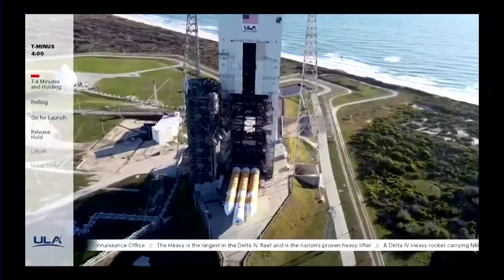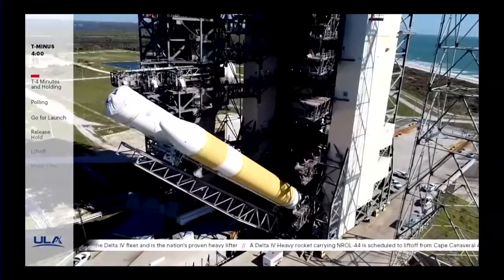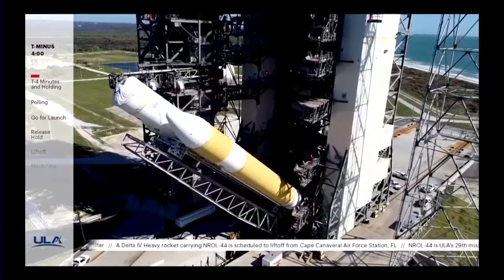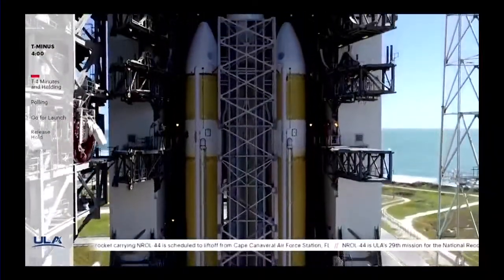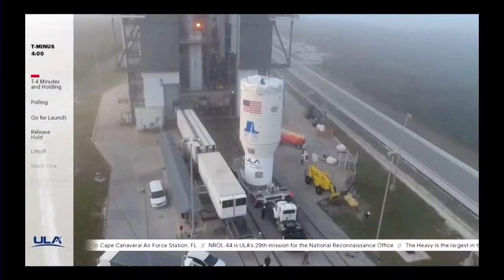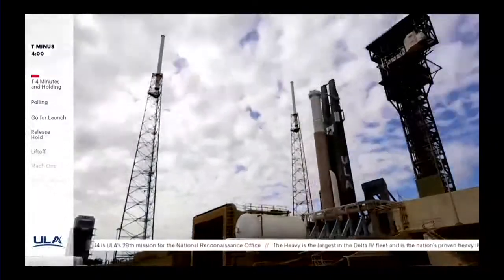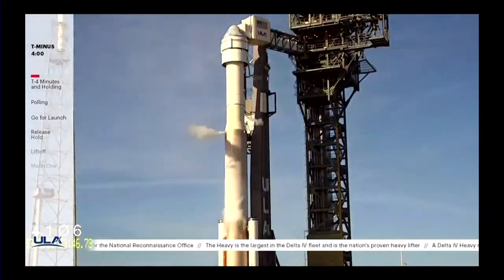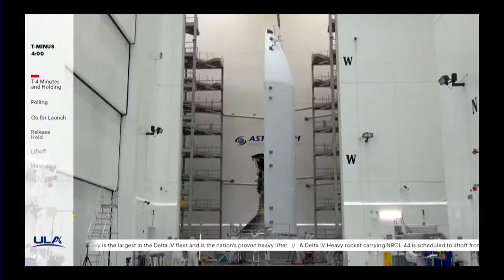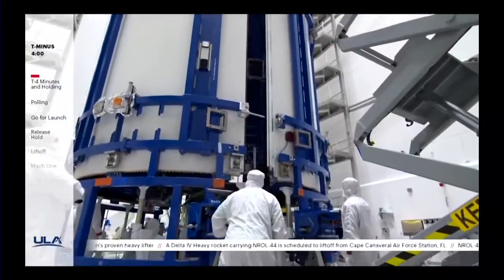Delta IV Heavy rockets are raised vertically by a fixed-pad erector at Space Launch Complex 37. The fixed-pad erector uses a single hydraulic piston to rotate the boosters 90 degrees inside the Mobile Service Tower, or MST. LVOS is followed by the addition of solid rocket boosters, and then the second stage. Next comes wet dress rehearsal, or WDR, which is an end-to-end launch simulation, from fueling through spacecraft separation. Meanwhile, the ULA team is also working simultaneously to help the customer encapsulate their payload into the rocket's payload fairing.